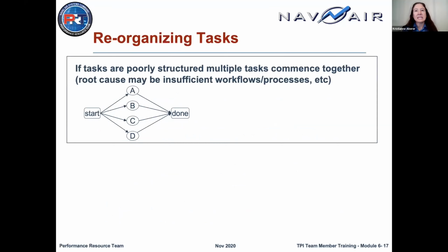All right, reorganizing tasks for earned value. So we have 2 examples here of tasking that should be reorganized, because you want to be able to show progress weekly, and these examples are preventing this. So in this first example, if a person started 4 10-hour tasks simultaneously and can't finish them except all at once, you'll have a lot of time invested with no earned value to show for 4 weeks. So it's really like you're working one big 40-hour task.